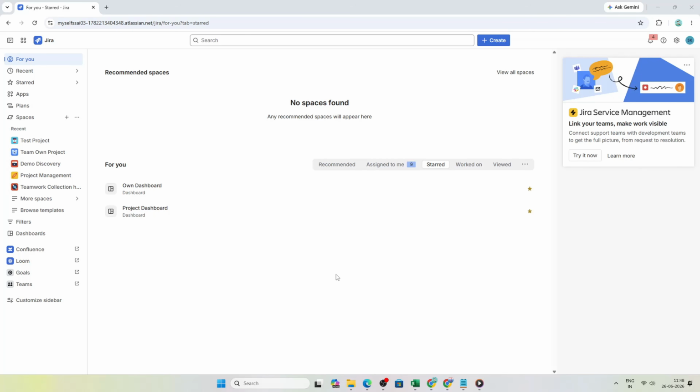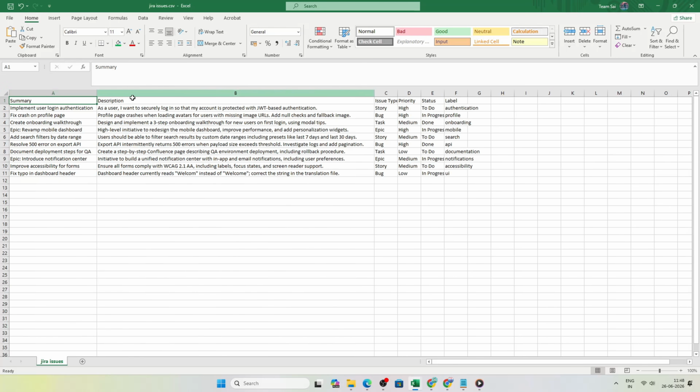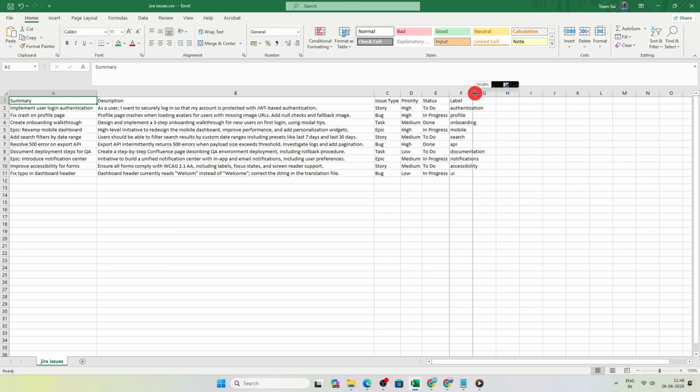In today's video, I'm going to teach you how to easily create Jira issues from a list with bulk import. To make this process smooth, the most important part happens before you even open Jira. Start by organizing your list into a clean table using Google Sheets or Microsoft Excel. Then save that file as a CSV.